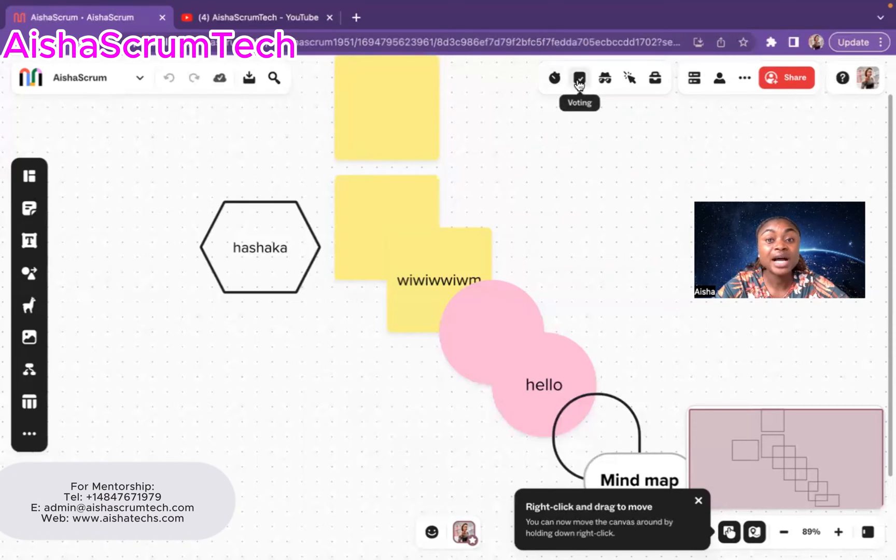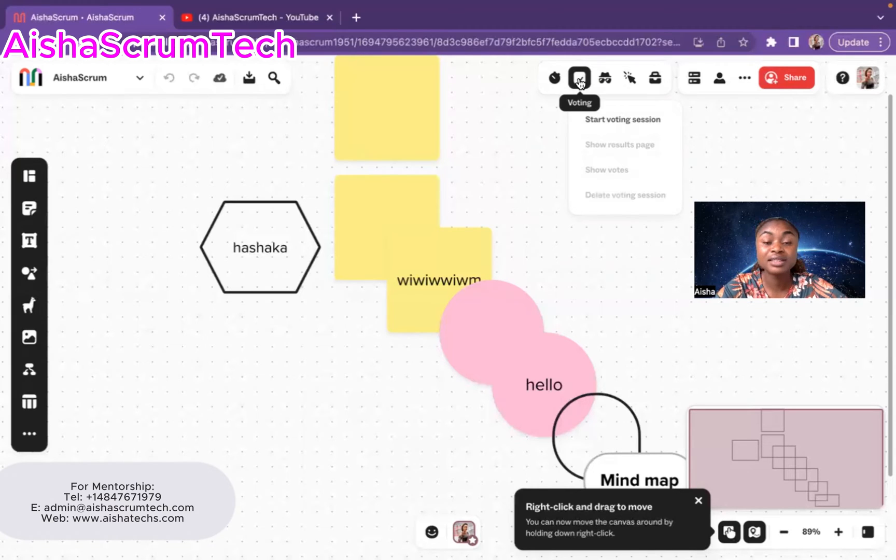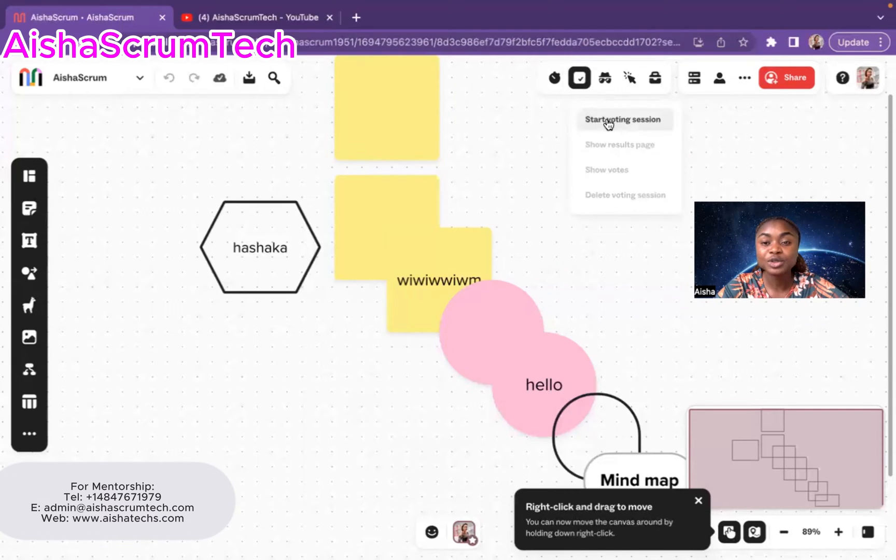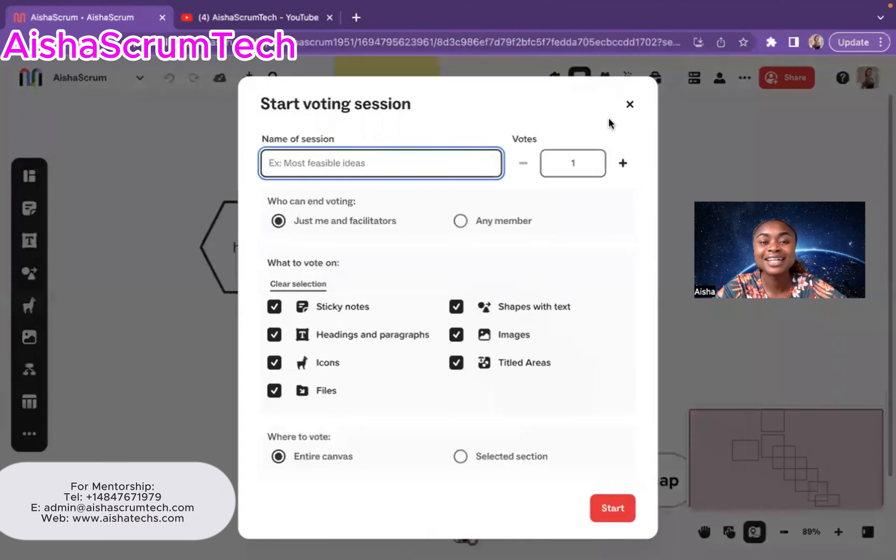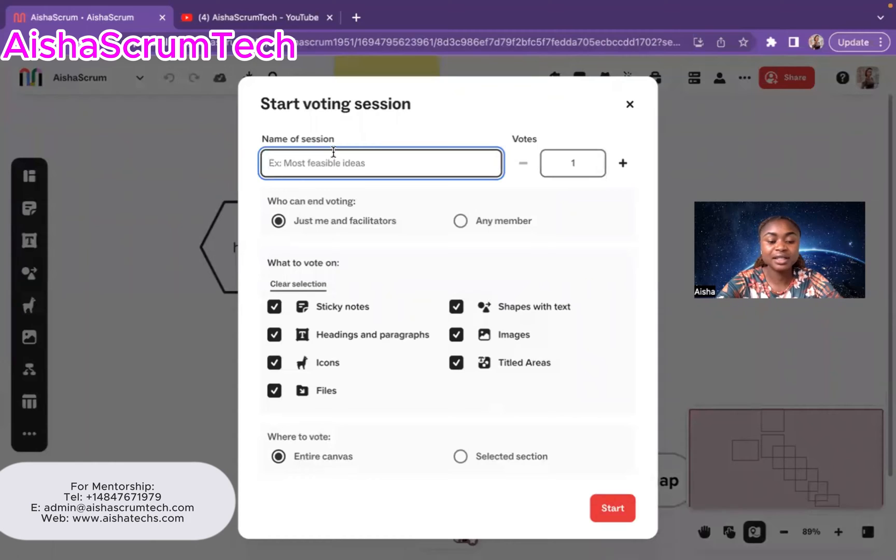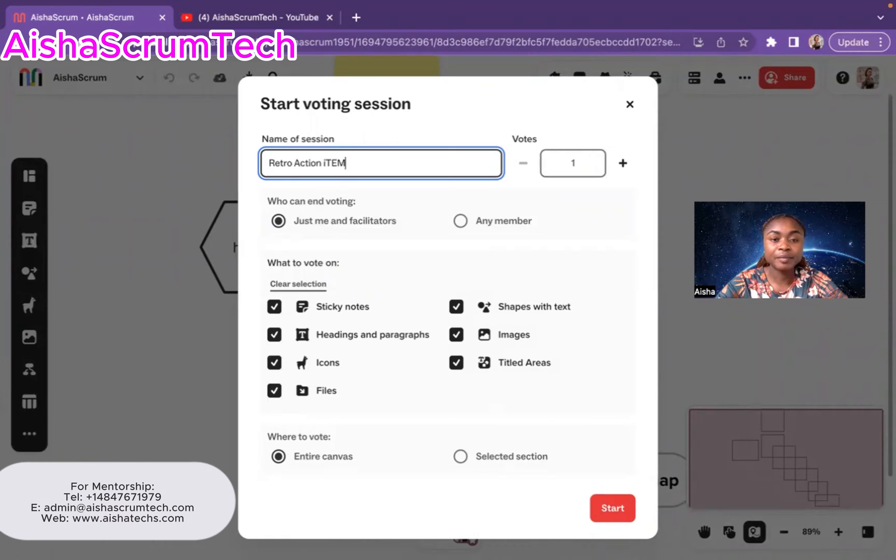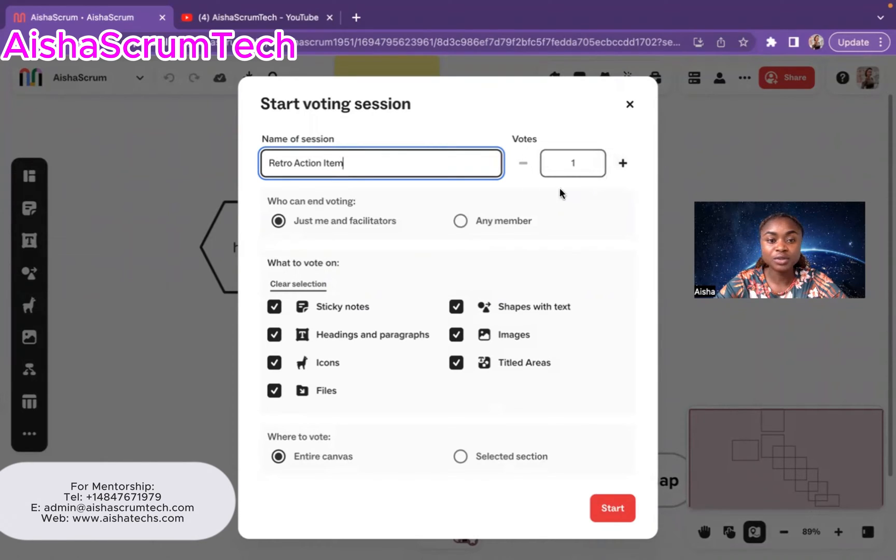So the next icon we have is voting, right? So we all know at the end of our retrospective, we're going to want to vote on action items or things that we plan to work on next as a team. And that's where the voting icon will come in place. Then you choose start voting because I have to show you all how to do this because there's a little trick with this. So you're going to name the session, let's say retro action item.